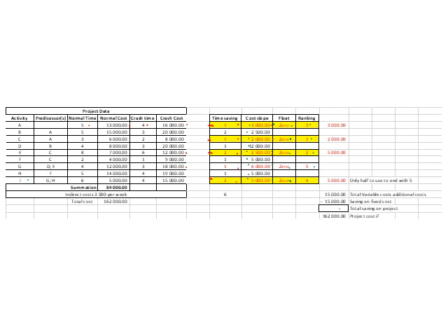What I just did here is to show you that if you add all of these items highlighted in yellow, you will get to 6 weeks, and thus we don't have to use the full one. Starting from our first one, our cost saving is 1 week, so we save 2,000 rand there.